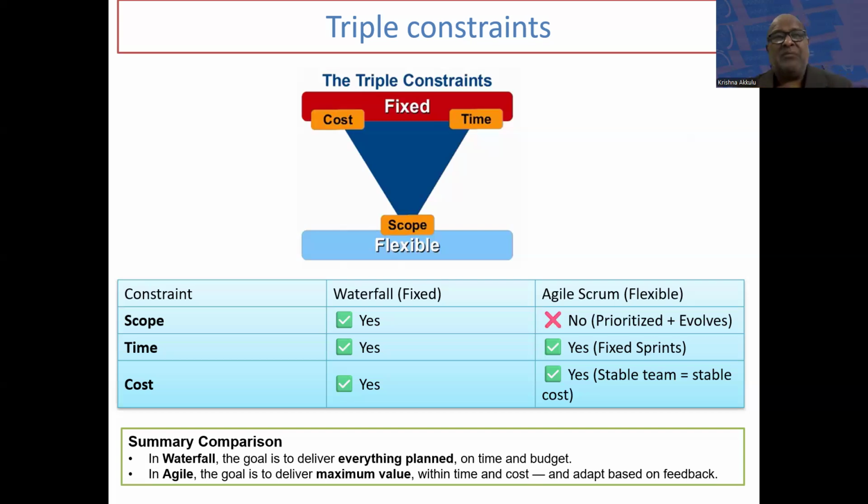Why is it flexible? Sometimes the team picks like 5 stories to complete in a sprint, but because of some reasons they are able to complete only 4 stories. Then what they do is build those 4 stories as working, potentially shippable software with no bugs, and deliver it. The fifth story will move to the next sprint.